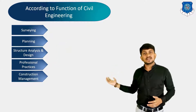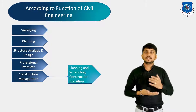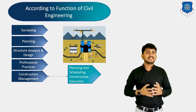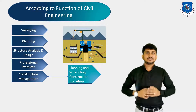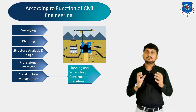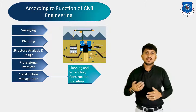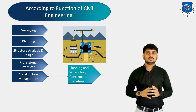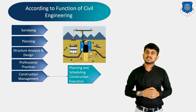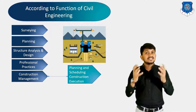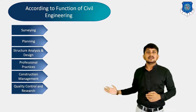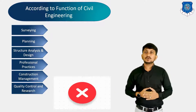For that, we have to prepare contract documents which are then signed by the contractor and builder. Next is construction management, which includes planning and scheduling, construction execution, and supervision. Planning and scheduling is the procedure of fixing the order of execution of different activities during construction, using methods like bar charts and the critical path method. Before construction it is required to estimate the actual expenditure, and during construction it is required to supervise the progress of the work as per the plan, design, specifications, and conditions of the contracts.